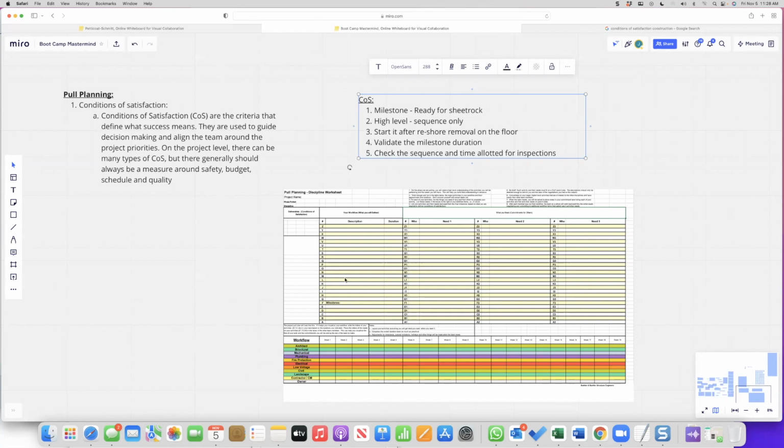And what they would do is they would plug in the milestone, the last activity, and they would literally work backwards. And once they entered in something here, like for A or Z, what they would do is they would say, what is A1? What are the things that I need from somebody else? What is A2? What do I need from somebody else? What is A3?